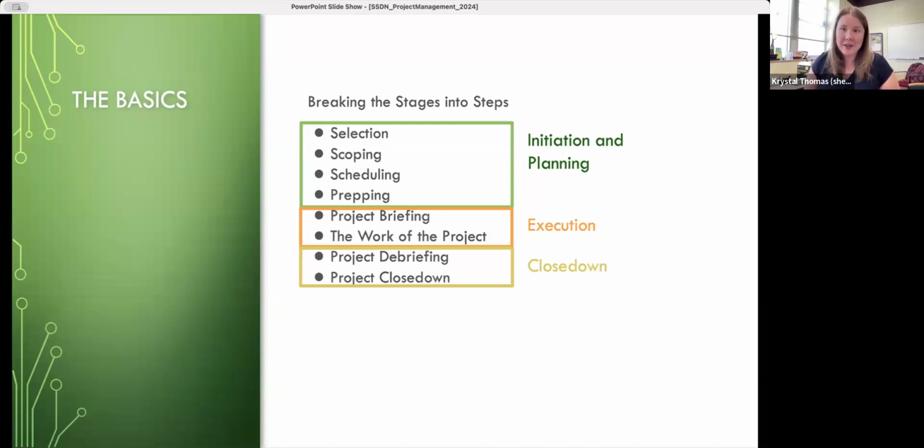If you read any of the literature in project management, those articles will usually estimate that at least 25% of the time spent on a project as a whole should be spent in the planning stage. I estimate in my work here at FSU, we're actually probably more at 30 to 35%, depending on the project, and if we've seen things like it before, or if this is something entirely new we're about to undertake.